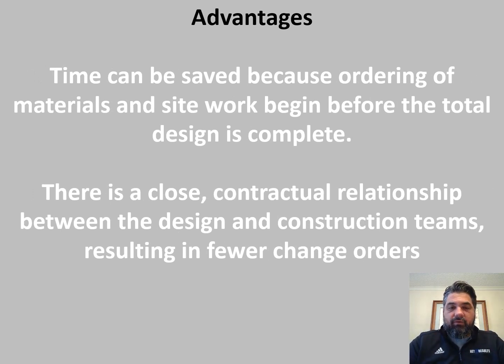Time can be saved under this delivery method because the contractor can work it out where they can order materials much earlier. They can say, look, we know this is what we're using because it's going to be economical. We're going to design around it, period. This is what we're going to do, so we can order stuff and get it on site. Likewise, site work can begin before the design is complete, because they're going to allocate so much money in the design build contract for site work, and we're going to move forward with it. So there definitely are some advantages in terms of reducing the time frame under design build contract.